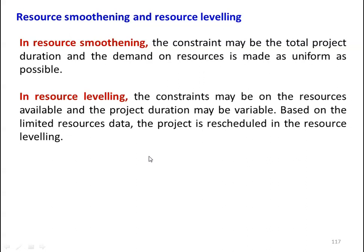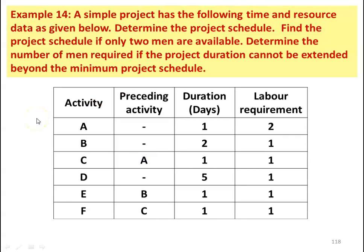We take one example to understand the concept of resource smoothening and resource leveling. A simple project has the following time and resource data. Determine the project schedule. Find the project schedule if only two men are available. Determine the number of men required if the project duration cannot be extended beyond the minimum project schedule.